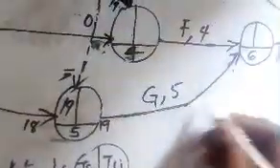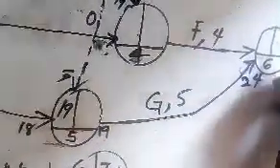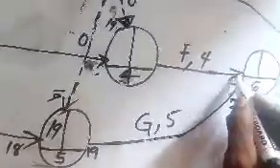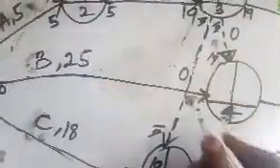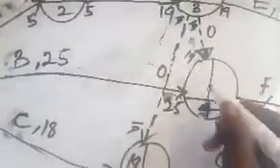Then 19 plus 5, that is 24. 24 can't enter because I don't know if this activity will be greater than this 24. So we come here, 0 plus 25. I have it as 25. Now you can see 19, 25. 25 is greater than 19, 25.